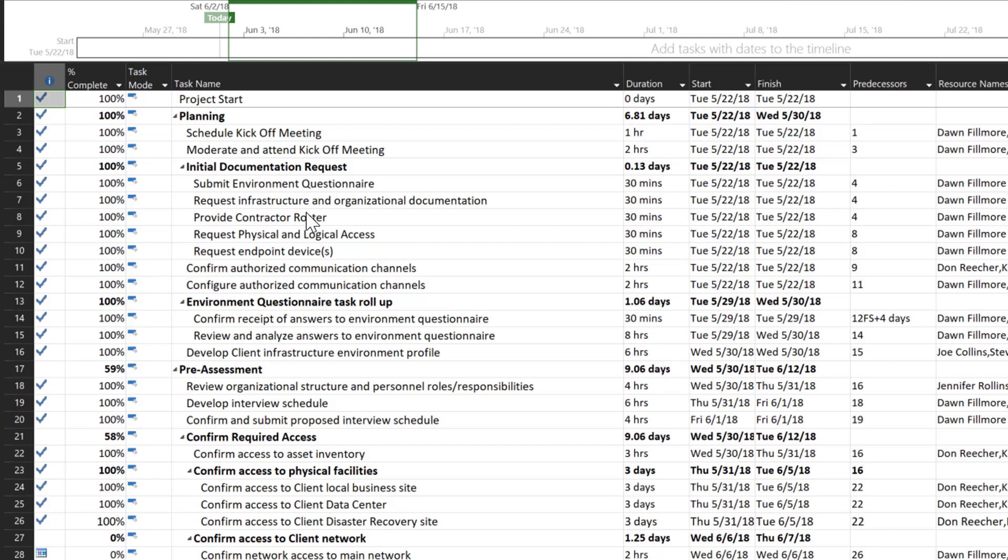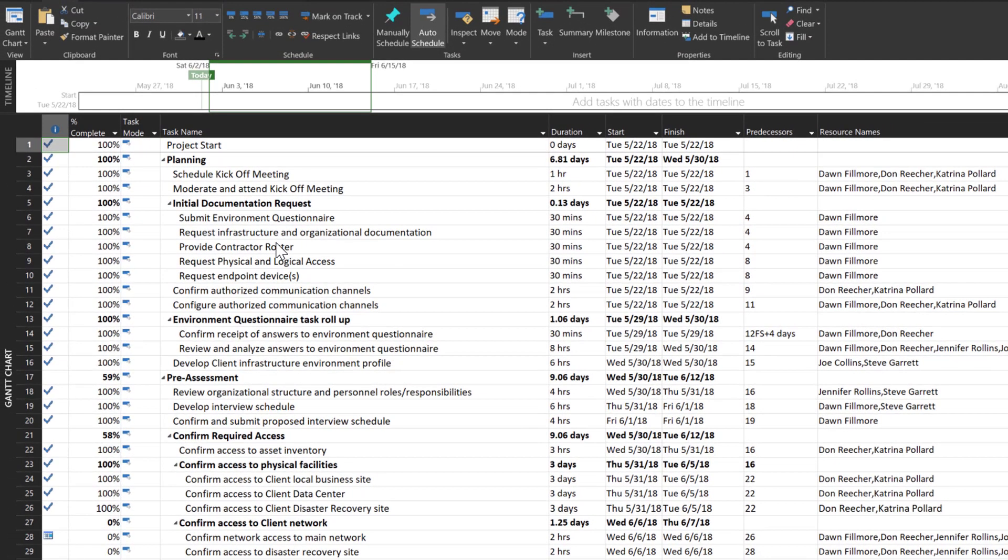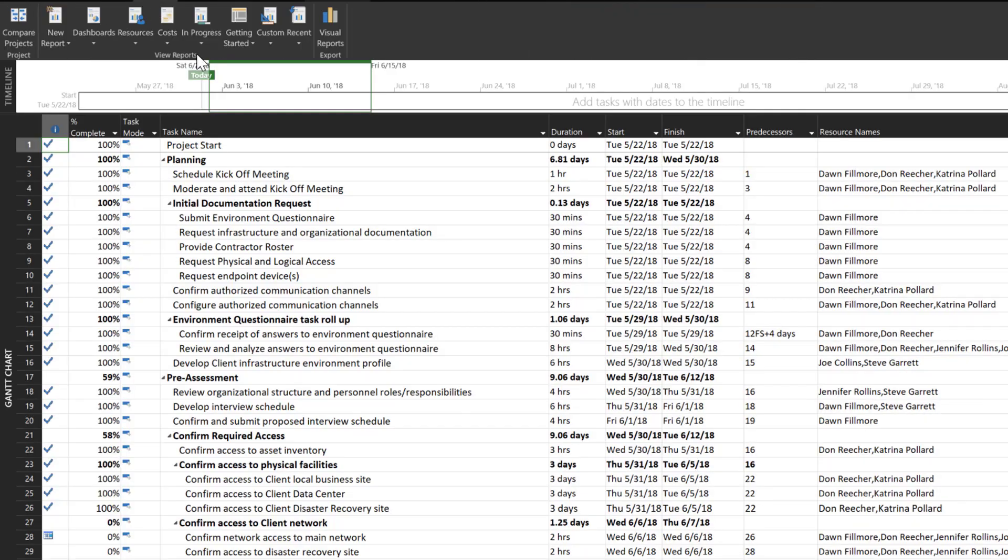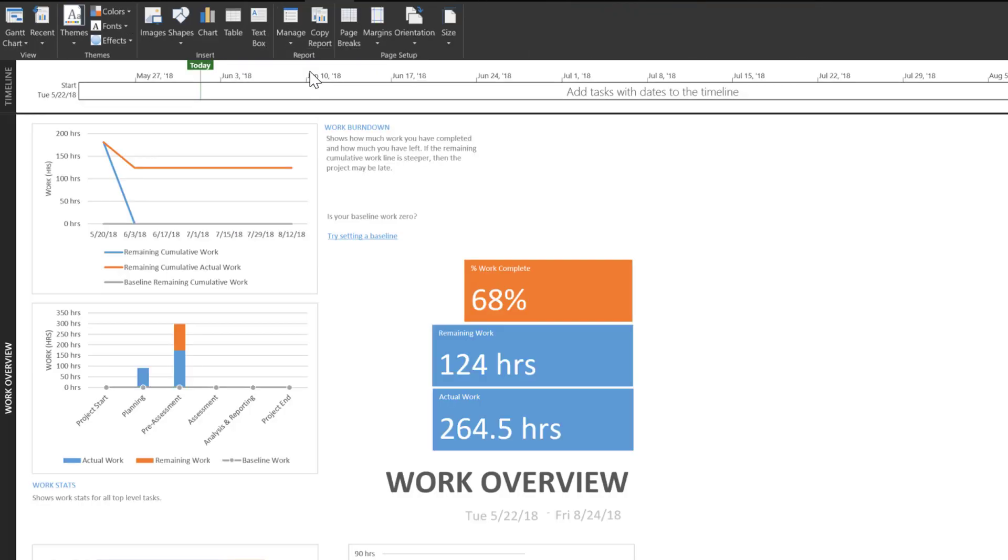If we select the work overview report that we have recently opened, we'll go to project, report, recent, work overview. We will see that 68% of the work has completed. We have 124 hours of work remaining and 264.5 hours of total work in our project.